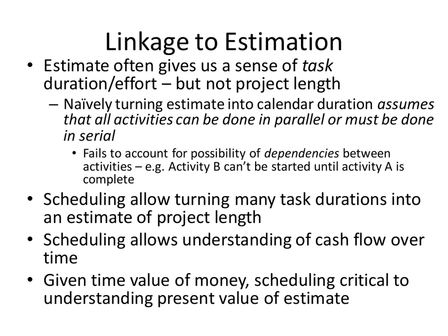So, using techniques of estimation, such as the decomposition-based methodology, we could take our project and let's suppose the amount of work that's required for a given incremental deliverable, and we could divide it into a set of tasks, which for the sake of estimation, we might further subdivide into sub-tasks, or small concrete pieces.